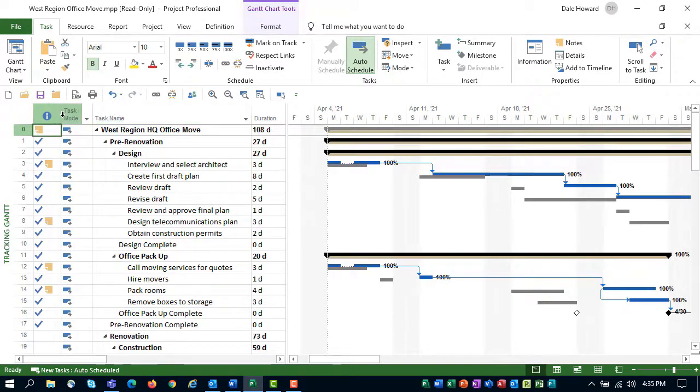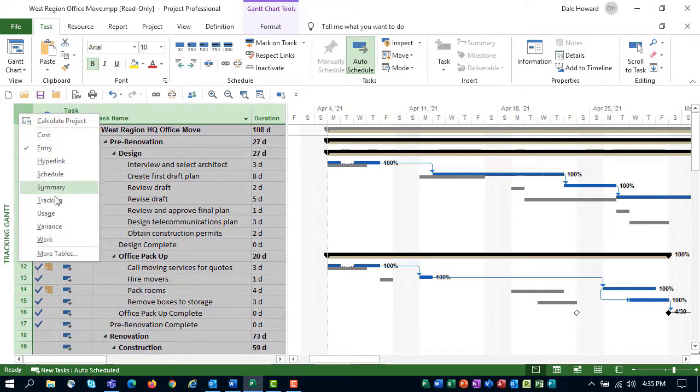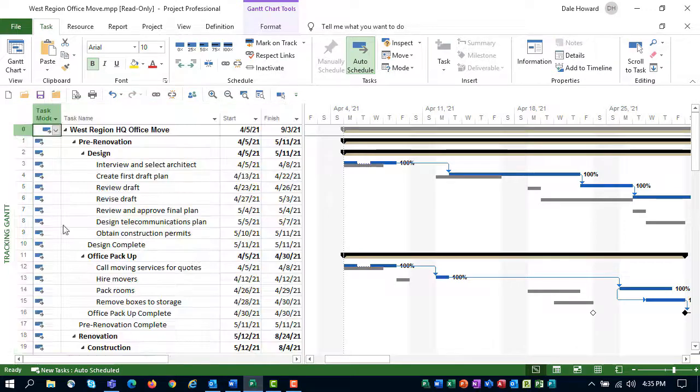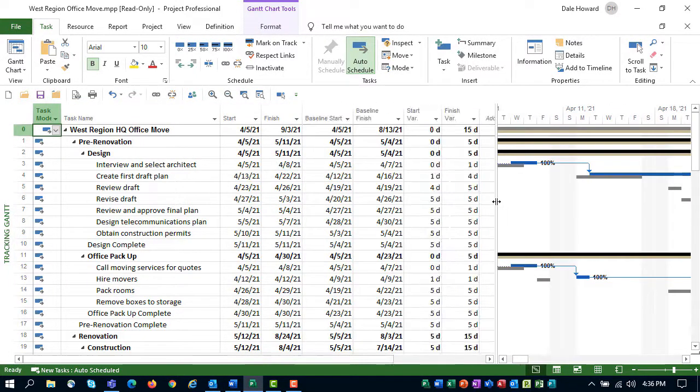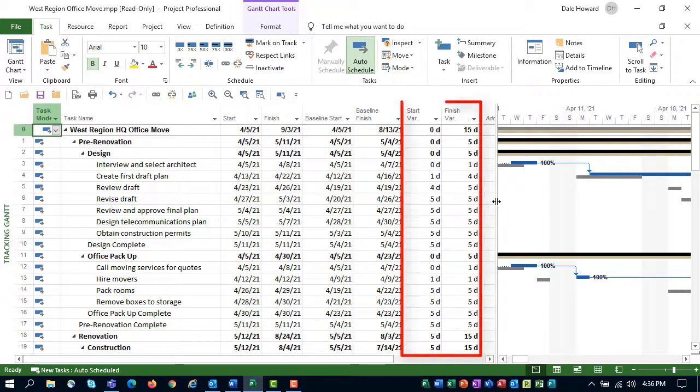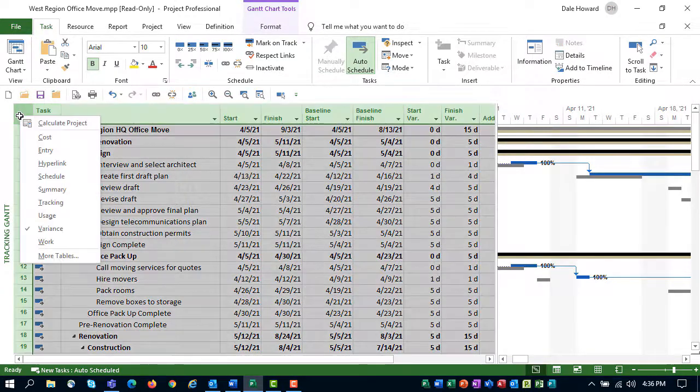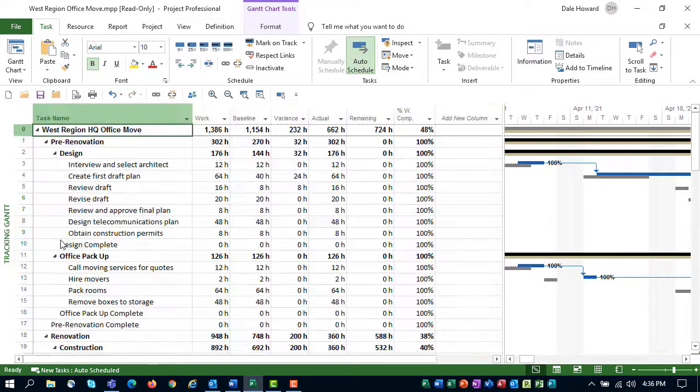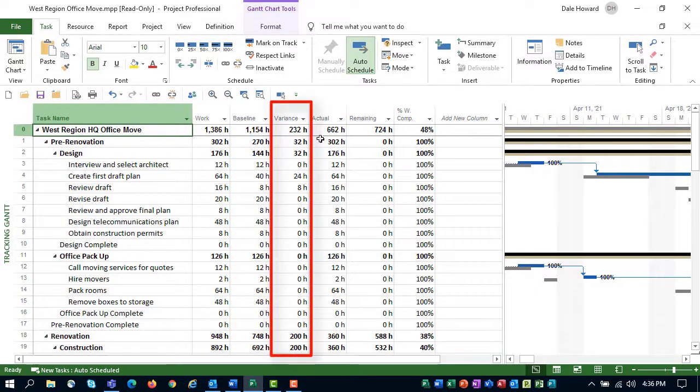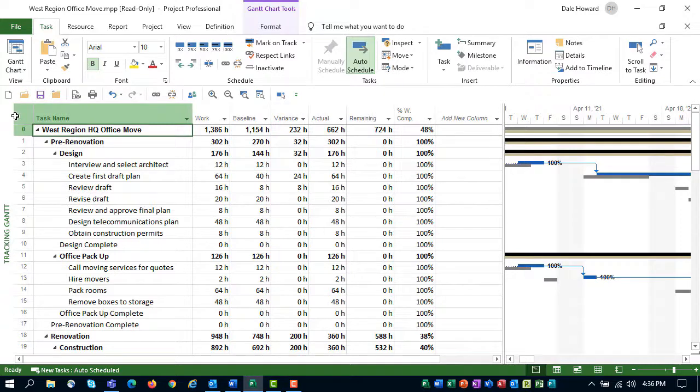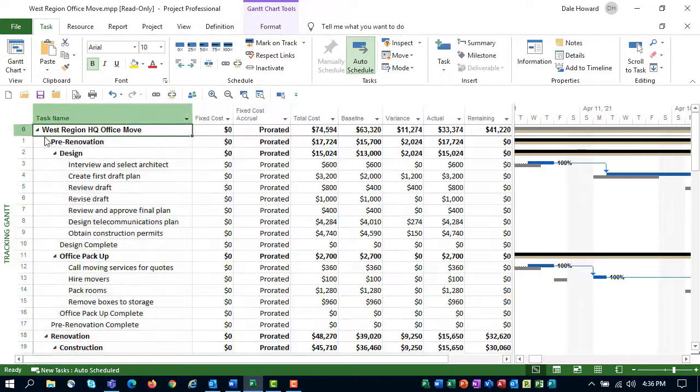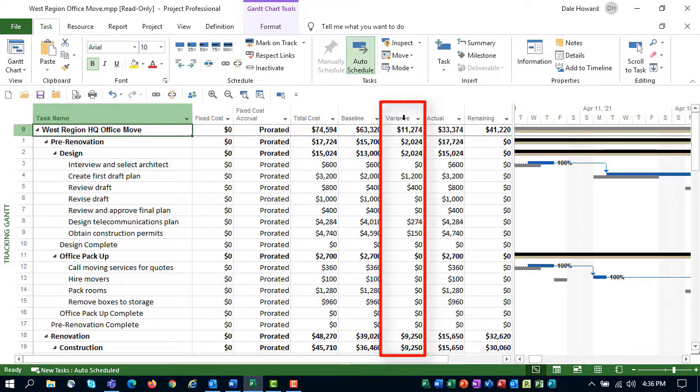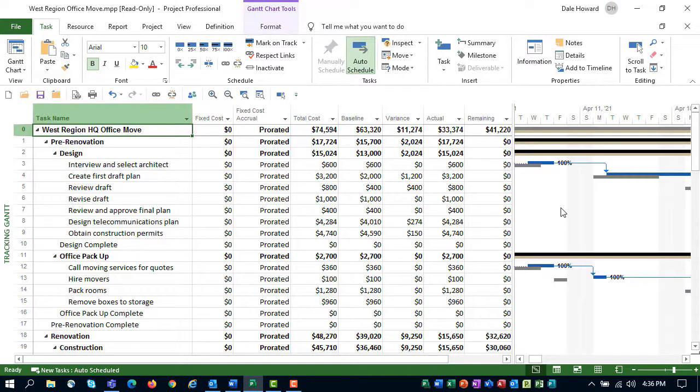You can also apply the variance table, and you'll see the columns start variance and finish variance. To analyze work variance, you can apply the work table, and you'll see the column called variance. To analyze cost variance, apply the cost table, and again, you can see the column called variance. However, there is no table or view that allows you to analyze duration variance. Therefore, we need to create a new custom view and table to allow us to analyze duration variance.